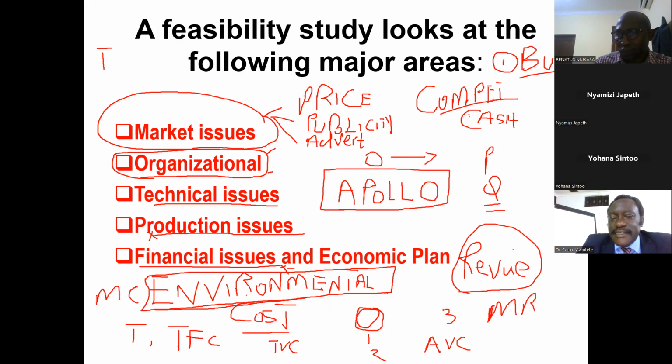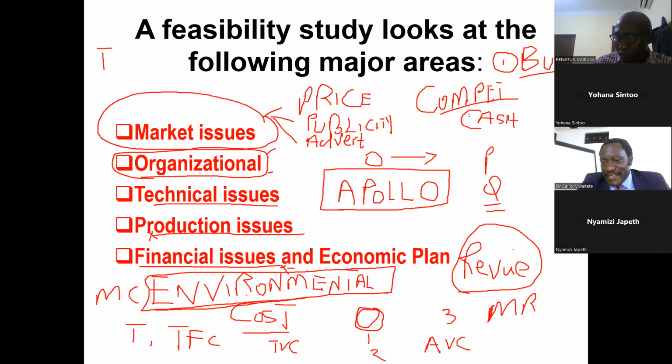As I said, there are so many. When you talk of legal issues, it's just a component. Within the feasibility, are we legally required to meet the requirements for constructions? Yes, legally, we will be required to get building permits. You'll be required to do the soil test.